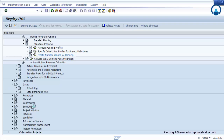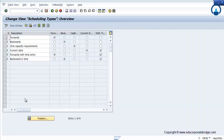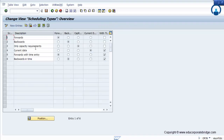One of the planning features in the SAP project system module is date planning. You can maintain date planning across the project — that is, the defined scheduling type: whether it is forward, backward, capacity requirement, current date, forward with time entry, or backward with time entry. These are the standard settings available in SAP.